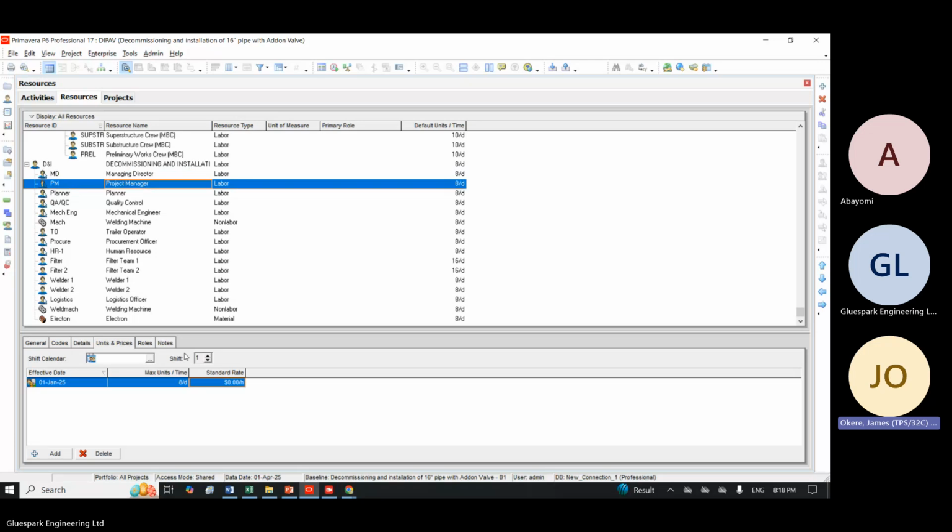Manager, let's say we are paying this manager $30 per hour. I'll put 30 here. Now anytime this manager is working, if you just multiply the number of hours that have been assigned for the manager to work times this 30, it will give you the price the manager will work for that day. So if you do it for the whole month, where the manager has been assigned to work, we get the total cost of the manager.